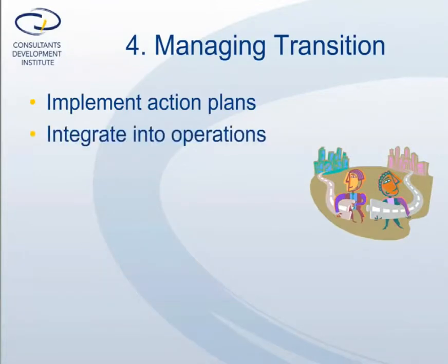Action plans are much more likely to be successfully implemented if they've been integrated into current operations. For example, responsibilities for action plans might be included in the current job description and performance goals. Meetings to review the project plans could be done during regularly scheduled staff meetings.